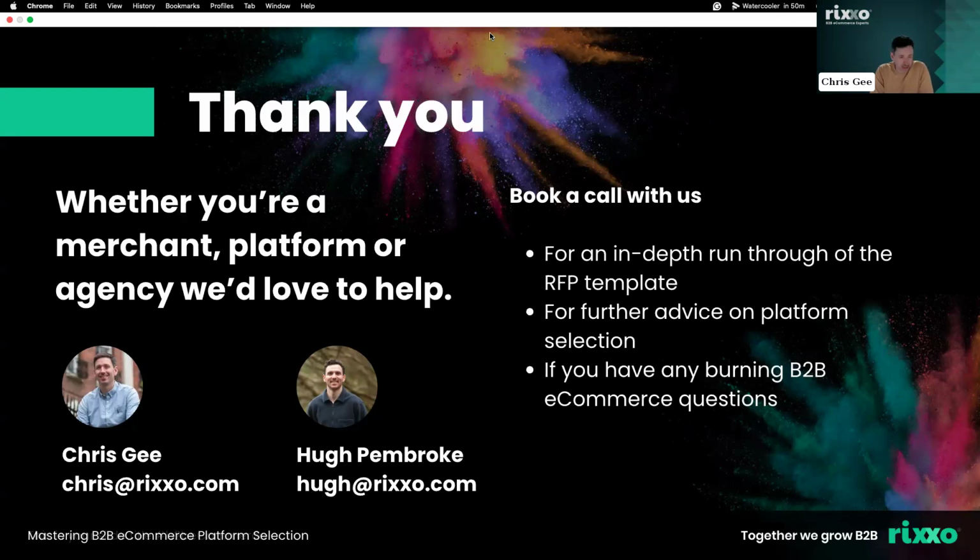You might be using an ERP right now that struggles to handle bulk orders, and then you would have to change that. And if you know what the future looks like on paper, you can test all of your theories before actually spending money on platform technology changes, training, because according to that framework, every change you make to people, to process, to platform, or any integration, it's going to knock on in some way or other. And so we want to be mindful that we don't make that change and create that chain reaction without being aware of what's going to happen. I think that's the bit that hurts people the most, is the chain reaction. An action of positive intent creates a negative feeling from a chain reaction.